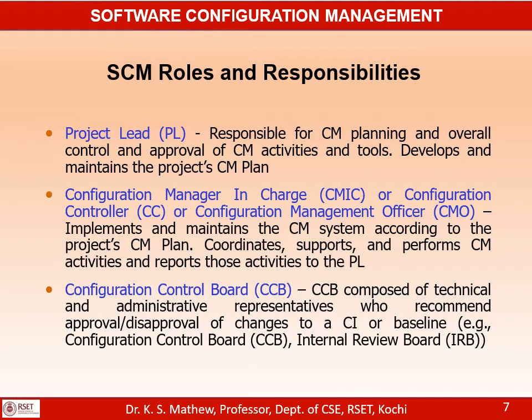So what are the different roles in a software project with respect to configuration management, and what are the responsibilities of those roles? In a software project, normally there will be a project leader who is responsible for project planning along with the project manager. The project leader is normally responsible for planning all configuration management activities of the project, and he has the overall control of configuration management activities. He owns all the tools related to configuration management activities, and he is the one who prepares the configuration management plan of the project.